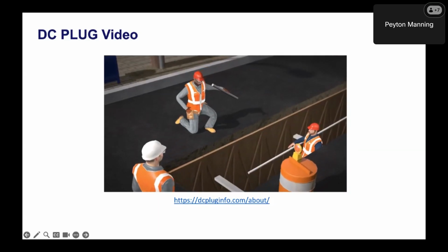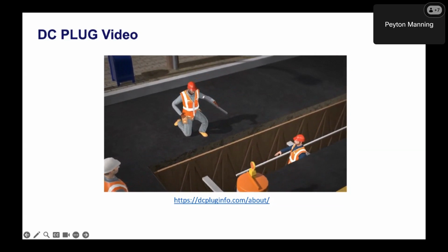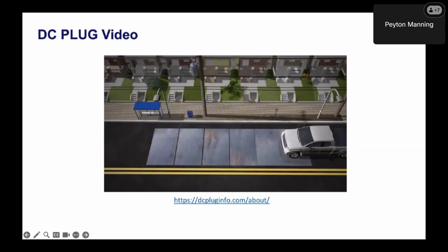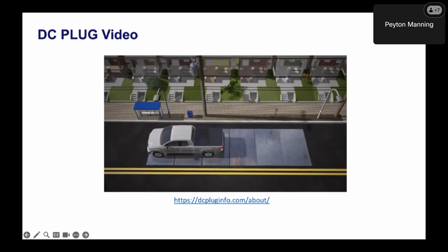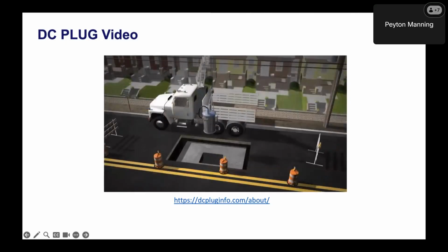Pepco uses either fiberglass or plastic PVC conduit to protect underground power lines. Concrete will be poured into the trench to encase and secure the conduit, and steel plates will be placed over the trench temporarily to make the road usable to vehicle traffic. After the concrete is set, the steel plates will be removed and the trench will be repaved in sections.